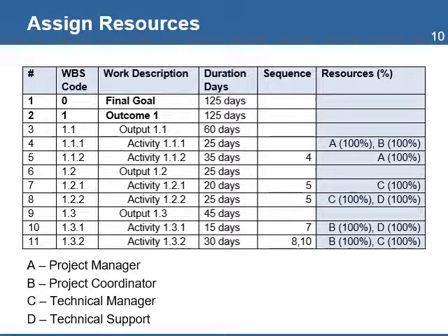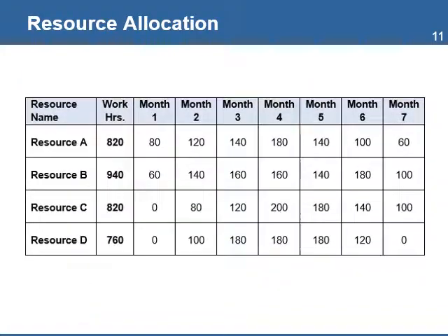Responsibilities are assigned depending on the availability of resources. Some activities will require a resource to be 100%, while other activities will require various resources to be at a lower percentage. The table below shows an example of a project schedule with assigned resources identified with letters. Once all resources have been assigned, you need to verify that there are no resources allocated to more than 100% of their available time. Most scheduling software can calculate this information and identify overallocations.